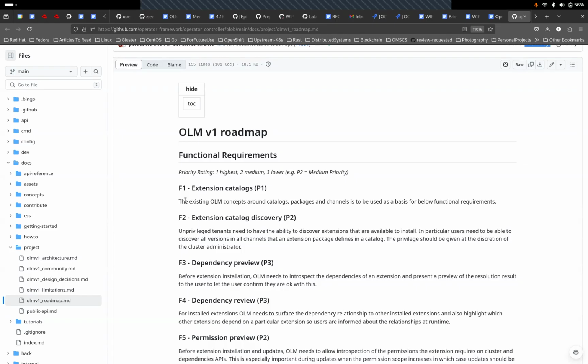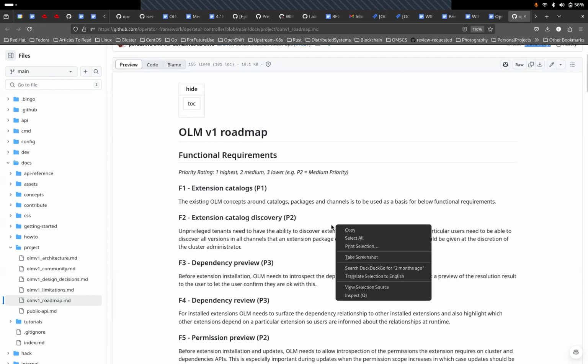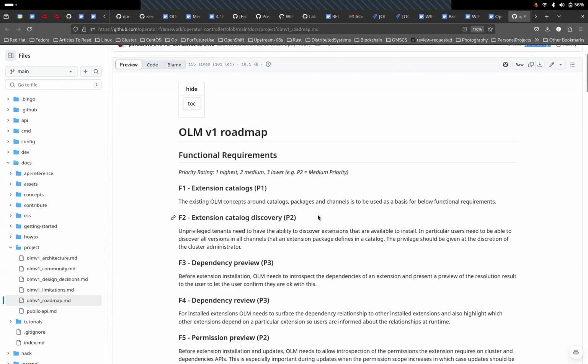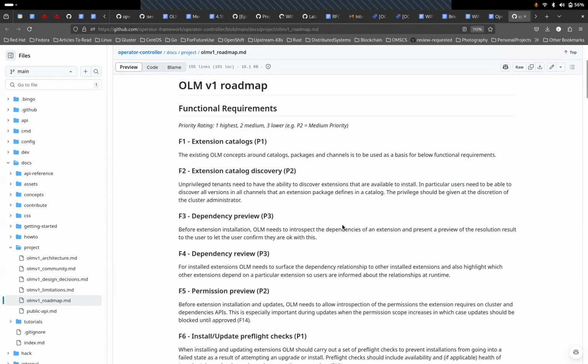I just put this in the chat too, but one of the challenges that we faced here is that this was an early document, and one of the things we ran into immediately was that a lot of these concepts are too high level to really map to an epic, so we needed to invest some effort to break them down into chewable chunks. So one approach here might be to revisit these and identify which ones are still on the table, and try to break them down in a meaningful way so that we could map them to epics.